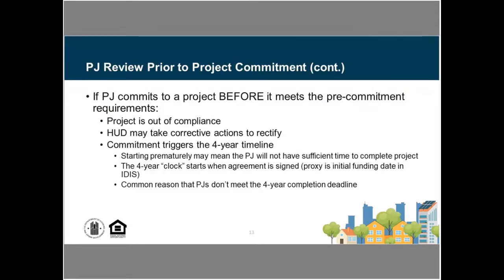So there is a risk of, if we had a project that were to essentially commit those funds before meeting these pre-commitment requirements, first of all, they would be out of compliance, and HUD would be perhaps taking corrective actions based on that. But the whole idea on having gone through this process prior to committing those funds is to make sure that that project, once it has been funded, is really ready to move forward.